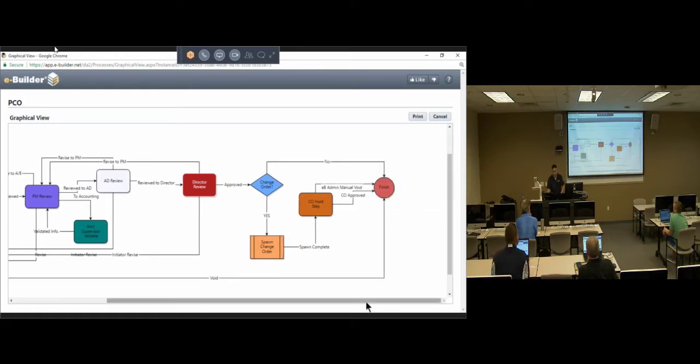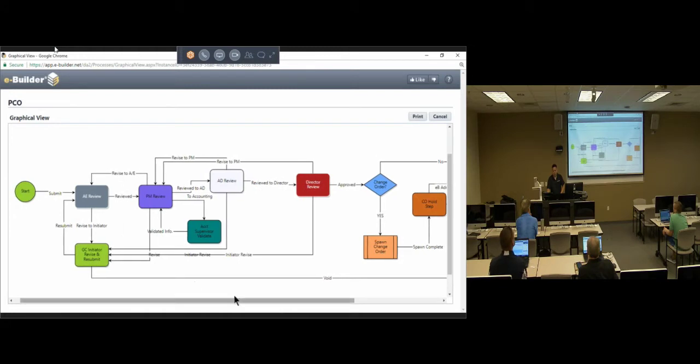Boom. I'm guessing you're going to want to make your correction and move forward with it. After the AE reviews it, they send it off to the project manager. PM reviews it, confirms. Well, there will likely be some communication going between you. Then they need to check with accounting. They optionally have to check with accounting to see if there are sufficient funds to move forward with this request. After accounting validates that there are sufficient funds, then it goes back to the project manager.